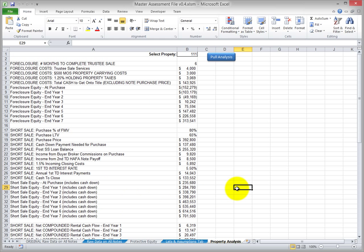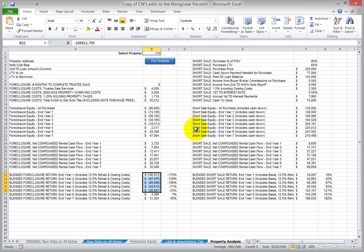After the customer reviewed the prototype, they returned with feedback. They liked reviewing only one loan at a time and liked the dropdown box selection method, but they wanted to rearrange some of the data. That's another strength of the Agile development model — it's easy to optimize user experience. Rather than completely developing a feature for maybe 20 hours, we uncover any redirections right away after spending only about 10% of the total development time required.